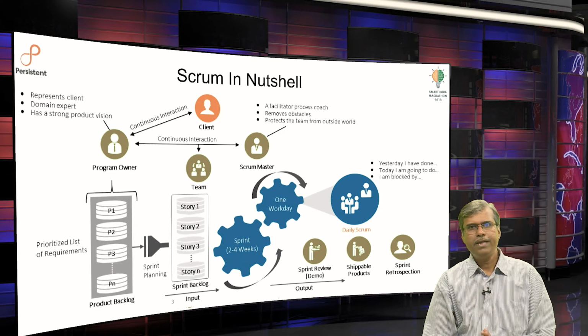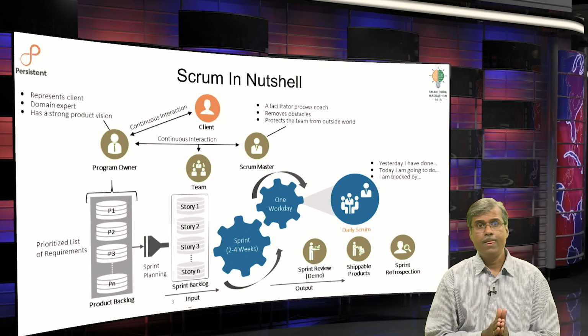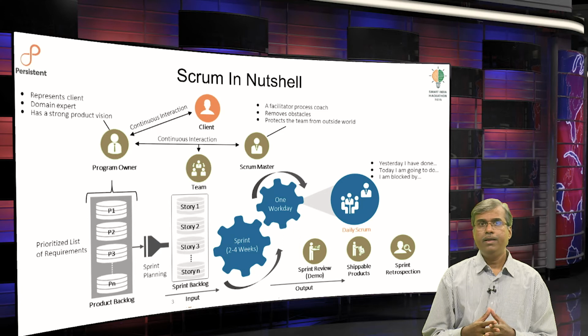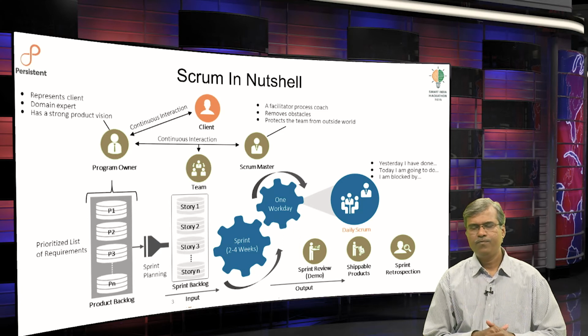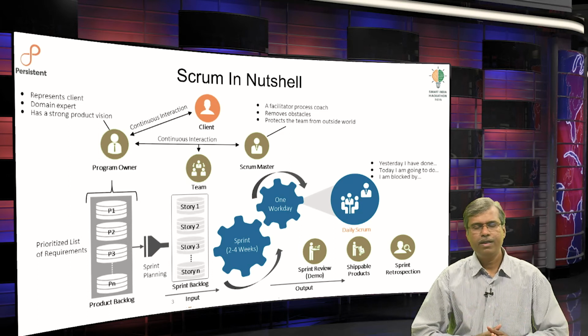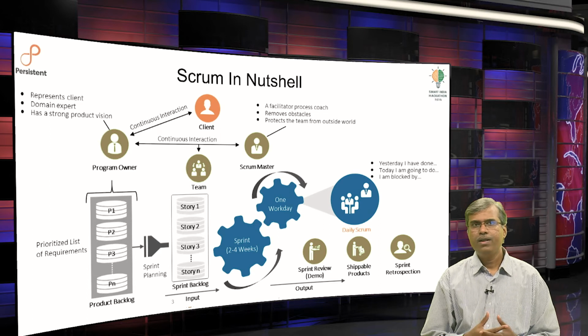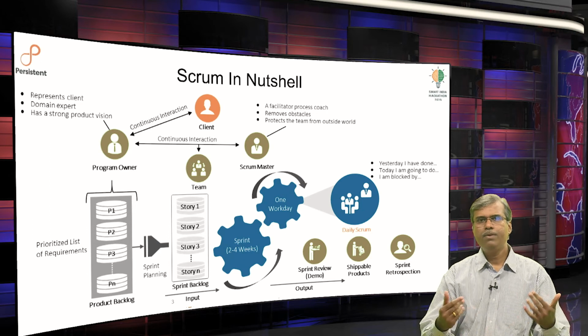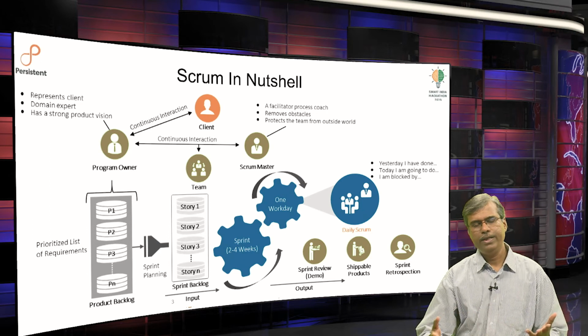Once the planning is complete, it is now time to execute. So, execution simply requires us to pick a story and start implementing. Here, unlike a conventional project manager, there is no project manager in a Scrum team, and there is no manager for assigning and monitoring your work and progress, because this is a collaborative, self-organizing team, and this is the characteristic of agility, that everyone is empowered, everyone is equally authorized to do things. So, team members simply pick up the stories that they would be working upon and delivering, right.